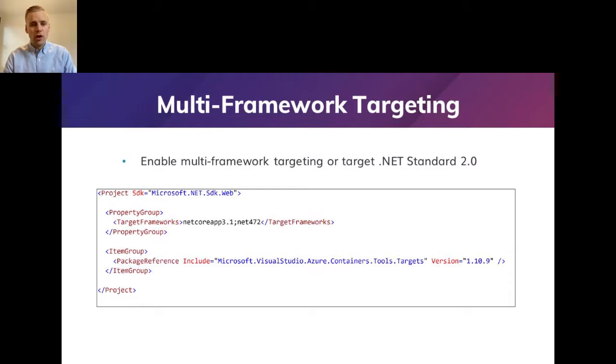So we decided not to upgrade Entity Framework to EF Core and instead stick with the old EF 6.4, because that would reduce the burden on this migration and make it a lot safer for us to do. I highly recommend this approach if you have the chance to do so, and take the EF updates separately, because it's going to be a lot more difficult and risky than what you want to do at the same time here. For example, we had like 400 different entities, and all of their mappings had changed, so it would just be a lot to take on to get that working.